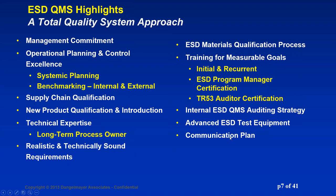A communication plan is so often underestimated. I had a woman in the factory — a really nice person who knew me well — and she approached me and said, 'Ted, when are you going to make up your mind?' She told me a particular requirement had changed three times in the last six months and it was driving her crazy. I asked her to tell me what they were, and she told me all three scenarios. I said, believe it or not, all three are incorrect — and I showed her the written requirements, which was yet a fourth version. If you send out information once and expect it's going to be received, you're kidding yourself. Place some emphasis on that topic. And of course, continuous improvement — you have to continuously look for better ways to resolve the situations that arise.